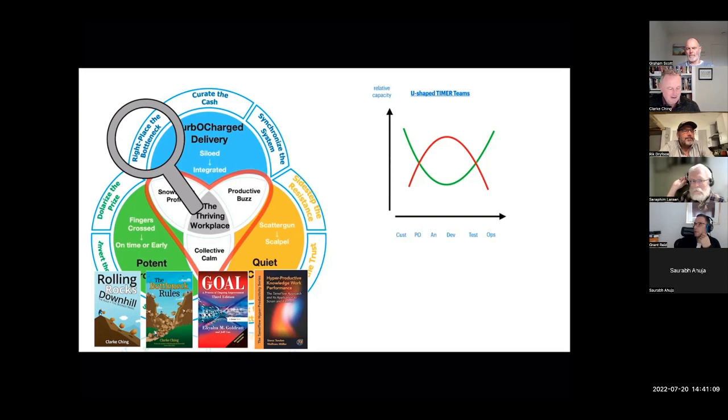If you know what the cost of delay is for things that are moving through your system, then you can actually figure out how much those particular points are costing you by either not addressing them, or how much time it's going to take to go through them, and make all sorts of interesting economic decisions that you couldn't make before. And it's all about making economic decisions, not just in a whole system view, but not just in the short term. The snowball effect, you've got to take that into account because it has ramifications for years ahead, and we tend to focus on the cost of delay of now.